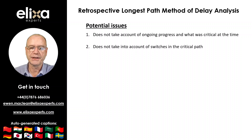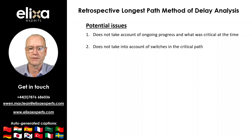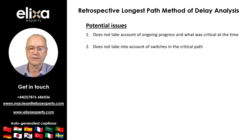Indeed, it identifies a single critical path at the end of the project and does not account for switches in the critical path during a typical construction project, where it is more commonplace for the critical path to switch. I would add that the retrospective longest path method of delay analysis can be distinguished from a longest path analysis identifying criticality at points in time during a project.